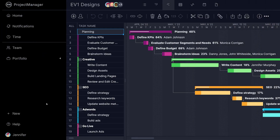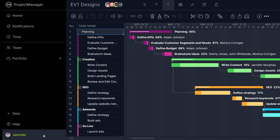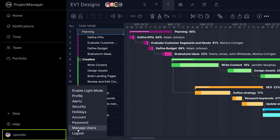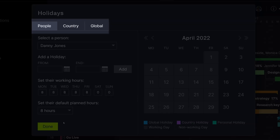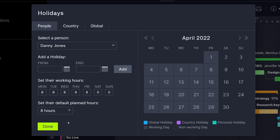Before assigning resources to tasks, it's important to go to your avatar's drop-down menu and select Holidays. The holidays pop-up will allow you to set global, country, and personal holidays, as well as global and personal working hours. This way, you always know when a team member is unavailable.